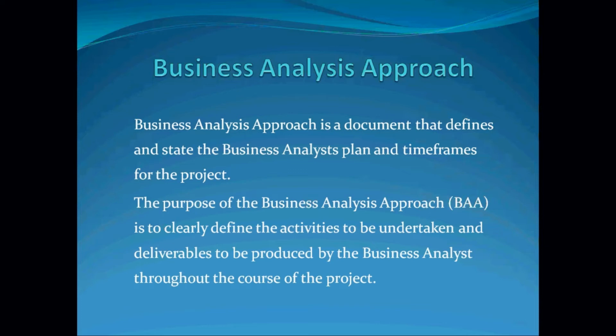And once they approve it, you now have to send it back to the project manager. The project manager will go through the document to agree with you if the deliverables you've stated in the document are fine. And if the project manager has something against it, you guys have to dialogue on it, saying, okay, these are the two deliverables that we need to document. But if there's any additional document that you need to produce, your project manager will let you know at that point, saying, oh, we need to produce this document as well for your work stream. You need to do this as well. Then you need to incorporate that.